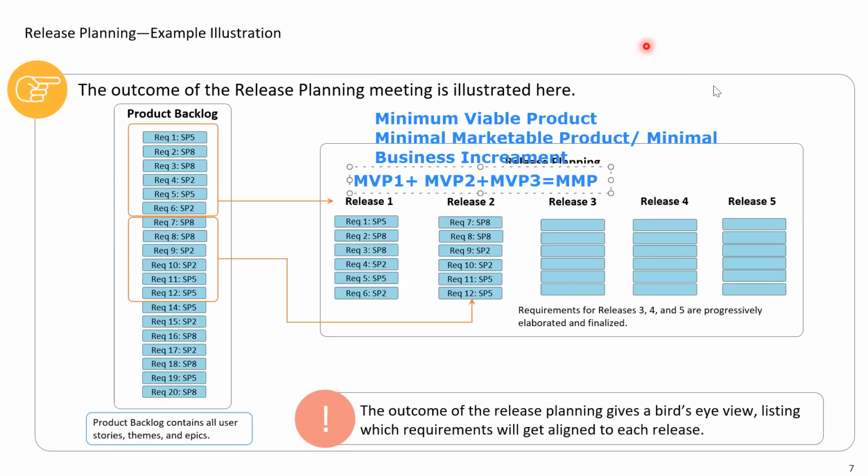Yes. See, you should demonstrate multiple MVPs in increments. You go through the first viability assessment, right? Then second, then third, then you launch MMP. Sometimes there can be multiple MVPs before you launch a minimum marketable product, right?